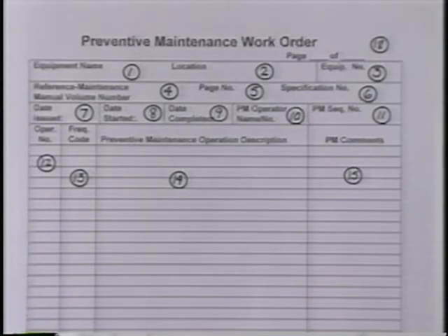That job sequence number is identified by straight numeric units of 1. In other words, the first time I did a specific PM activity, and let's say it's a monthly for illustrative purposes, the first time I performed that monthly PM, the sequence number is 1. The second time I performed that same monthly, the sequence is 2, and so forth.